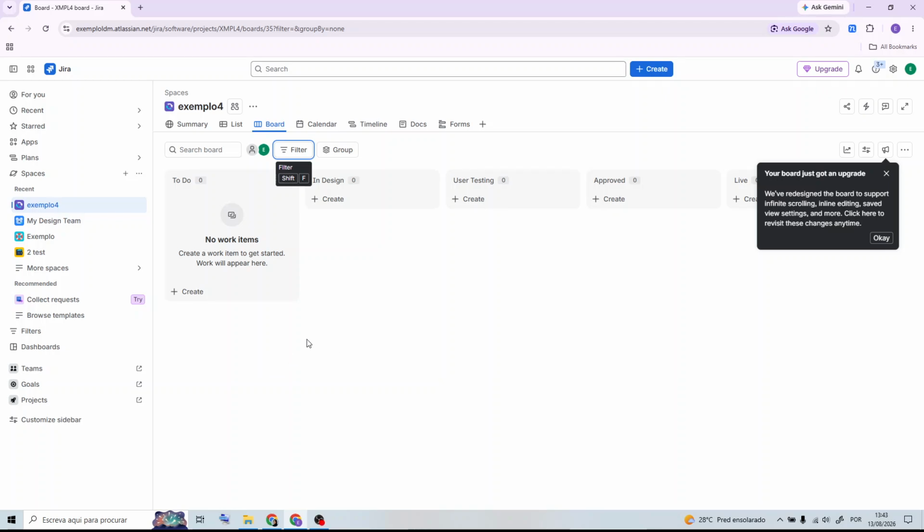In this video, I'll show you how to create a Kanban board in Jira. First, log into Jira and open the project you want to use. Next, go to Boards and select Create Board. Now choose Kanban as the board type.